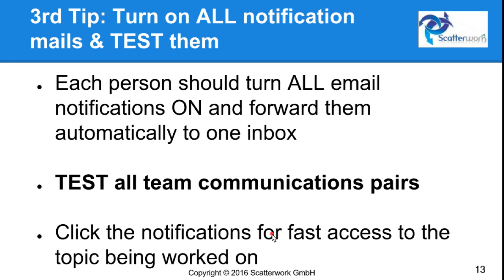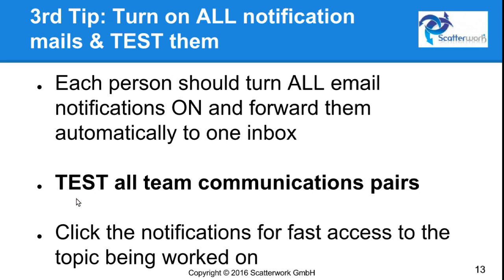The third tip is that each person turns on all notifications and forwards them automatically to one inbox. Then here's the big one: test all the communication pairs between yourself and everyone else — confirm that when you send a message they get an email notification and that it doesn't go into spam. Because if it does, that delay of days makes it impossible, not just difficult but impossible, to solve problems.